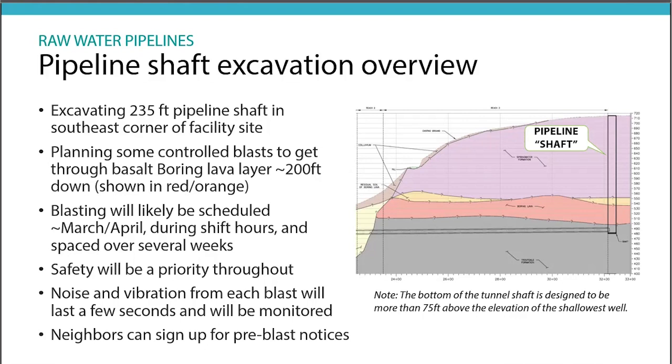Our design engineers considered the locations of the wells, and when they allowed blasting to be included in the project, they're rock engineers, soil engineers, geologists, hydrogeologists that all designed this. And they took that all into consideration and determined that the risk was extremely low. But we are taking precautions. One, Jim addressed how the blasting will occur, but we also got some baselines on all the wells surrounding this area, all the immediate wells, anyway. That way, if something goes wrong, we will make things right. But it's an extremely low probability.